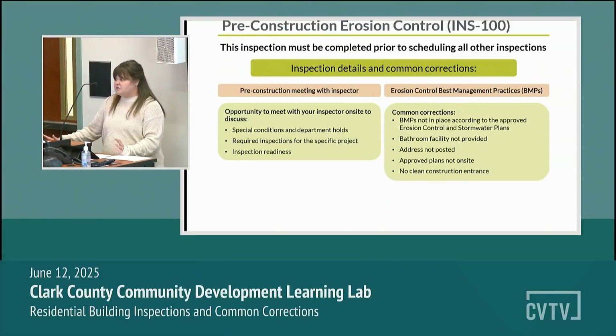Moving on to the first inspection that's required for all residential projects. You're not able to schedule any other inspections until this one has been completed. This is the pre-construction erosion inspection.